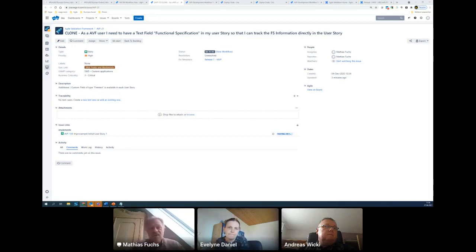confirming that under these conditions, nothing has changed for the next release. But you still have to go through that phase, not to forget it, because maybe a second supplier and a second module will be added to the system, and then you would have to do a second supplier assessment for this new supplier. Or you would have to slightly adapt your validation plan in case there are new modules that require a different approach to validation, like a scope change.